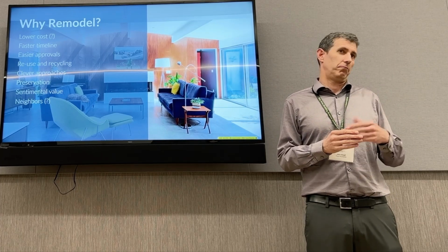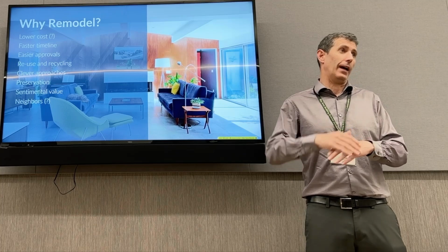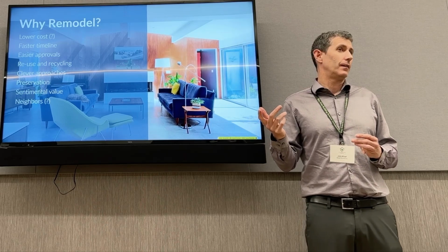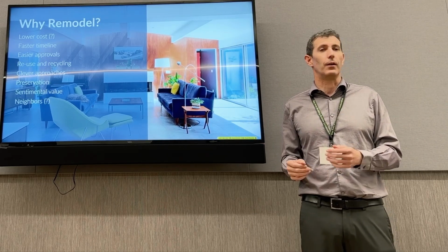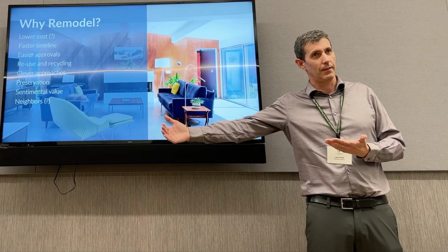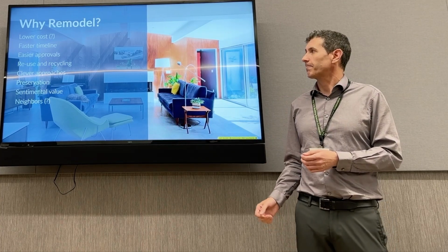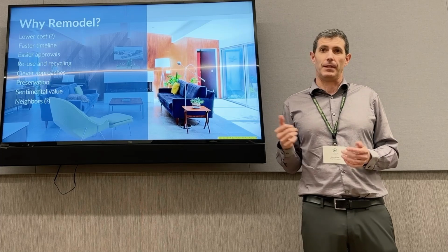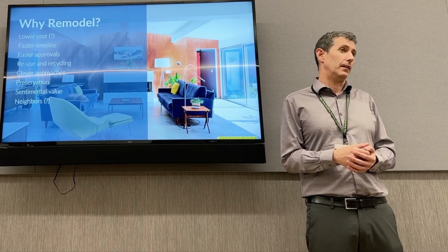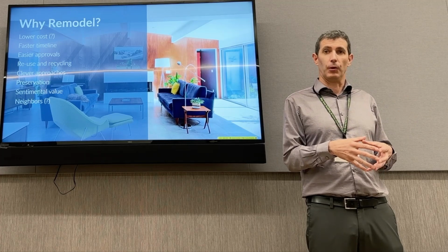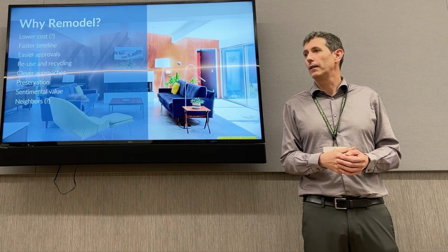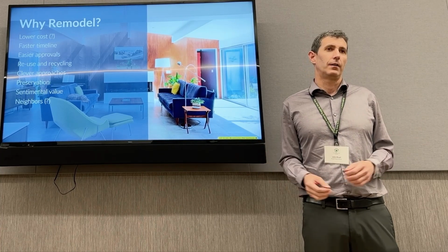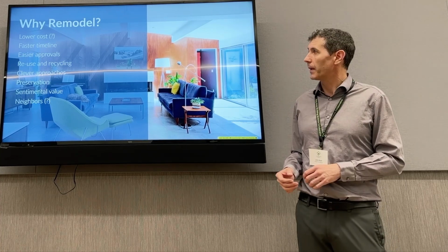If you add 500 square feet, maybe you're exempt. If you don't add a second story, maybe you're exempt. You can have a lot more exemptions to design review. In the same jurisdiction, if it's a new home, design review. So that design review adds length to your approvals process. Also part of the faster timeline is going to be the time it takes to build. My experience has been that it typically takes less time to build remodels, and again, the smaller the remodel, the quicker. And I'm sure that's not always the case, but by and large, it's typically faster than a new home.